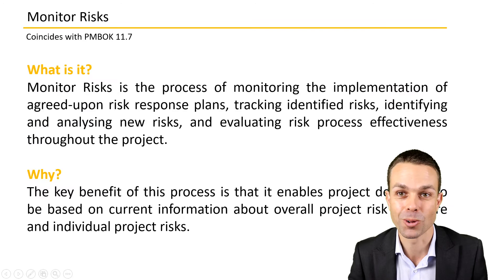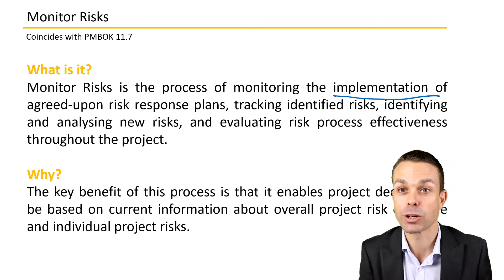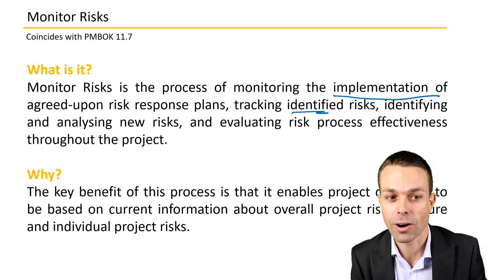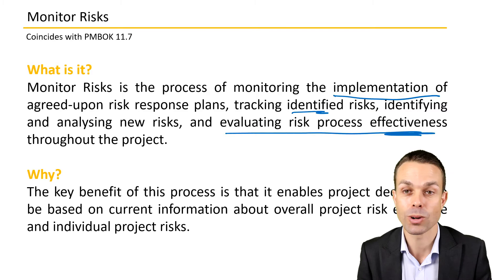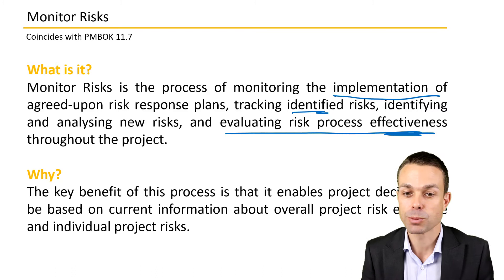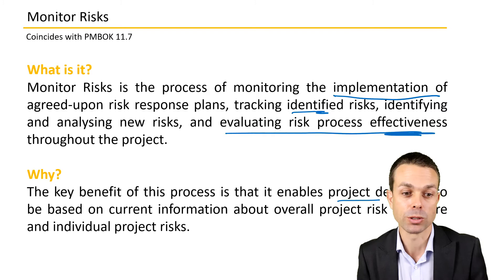Monitoring the risks is the process of monitoring the implementation of agreed upon risk response plans, tracking those identified risks, identifying and analysing new risks, and evaluating risk process effectiveness throughout the project. How are the risk responses tracking? Are they doing the things that we wanted them to do? Are they having the effect that we wanted them to have? The key benefit of this process is it enables project decisions to be based on current information about the overall project risk exposure and individual project risks.